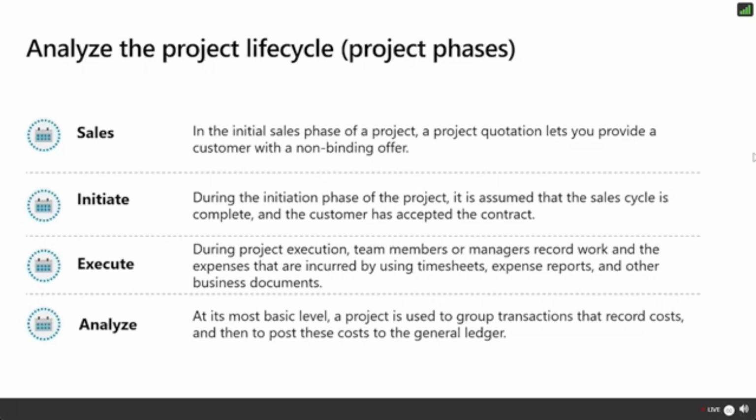In this phase, the project managers finalize everything and then hand over the project deliverables to the client or the stakeholder. They're going to prepare a really thorough project report to review the work that was done, and then any resources that were brought in to work on it are going to be released, and the contract's going to be closed out. The project managers are going to work with the back office to review things like project documentation and ensure that everyone that was involved is receiving what they were promised, so everyone's getting paid.